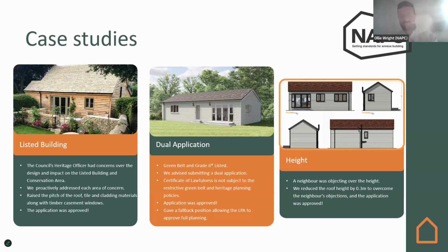We revised the drawings back into the officer, and he said, "Great. It's not perfect, but I can see you've tried, and there's a compromise on both sides to be had. I'm now happy to approve that application." So what a great result. The neighbour was happy, the officer was happy, and more importantly, you as the client would be happy too. So early engagement and making those changes got that application over the line.